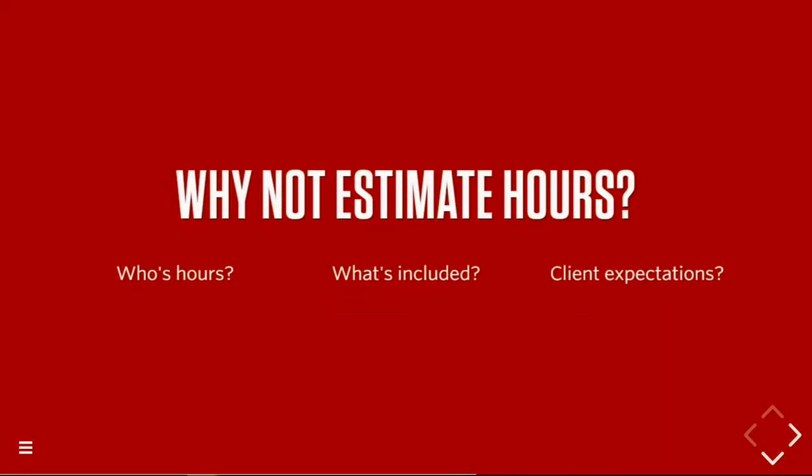And why do we not estimate hours? Because I write CSS and you write modules, we're not going to agree on the hours. And do hours include requirements gathering, code reviews, deployments, tests, rework? And if a task is estimated at 3 hours, what happens if it doesn't take 3 hours? Is your client going to get irritated because a particular task wasn't nailed, or are they going to start assuming that you over or underestimate everything and build that into their expectations?